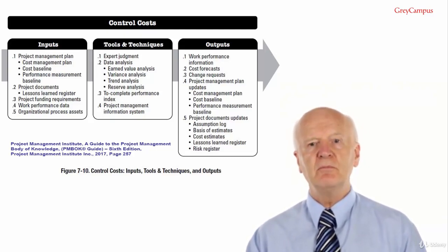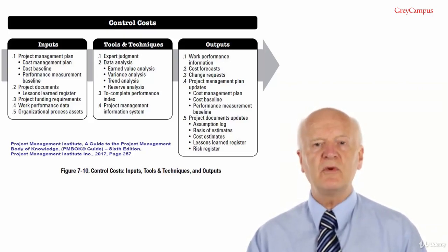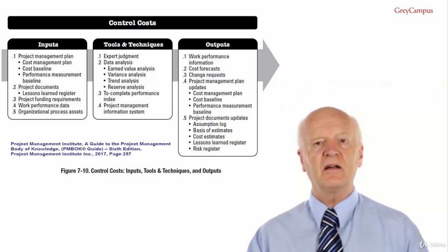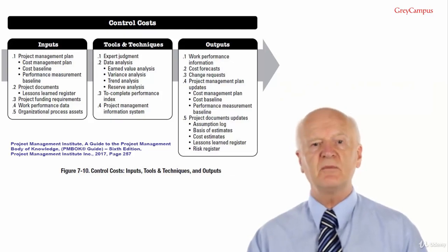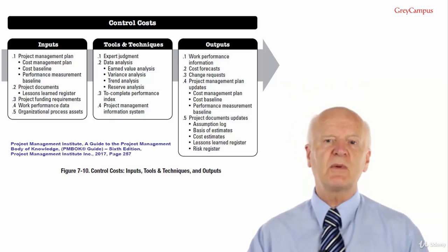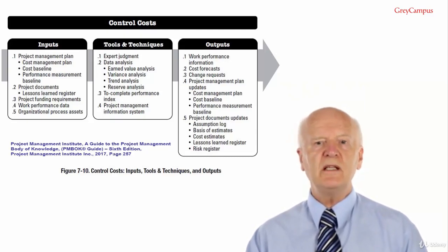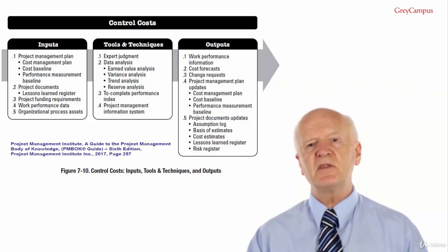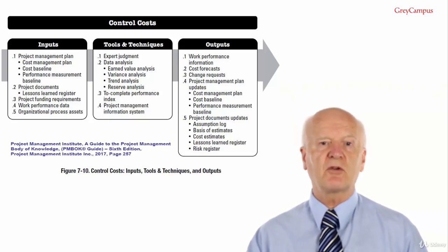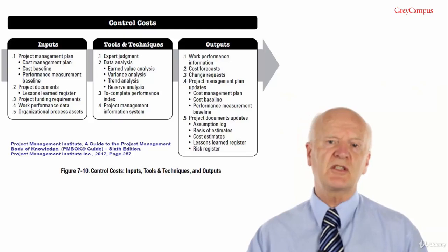Remember, both of these are in terms of the original budget. That is actually totally vital to your understanding how earned value works. It is the budget associated with the authorised work that has been completed. Progress measurement criteria should be established for each work breakdown structure component to measure work in progress. We will cover this later, but it means we need a way to measure the earned value of the work. With the brick wall it's quite easy, but many activities on a project do not have a linear relationship. For example, if the project is create new software, it is very difficult to estimate the work done.